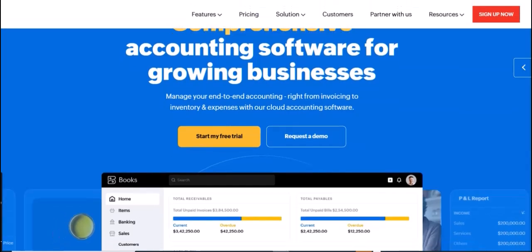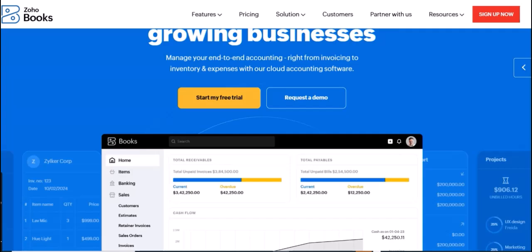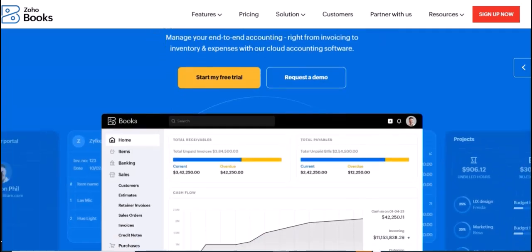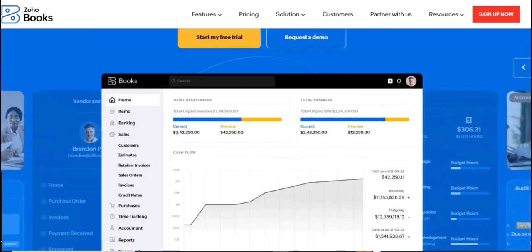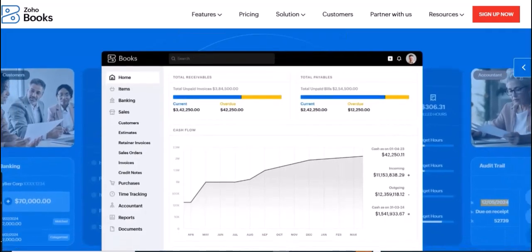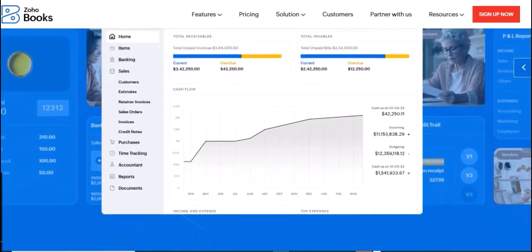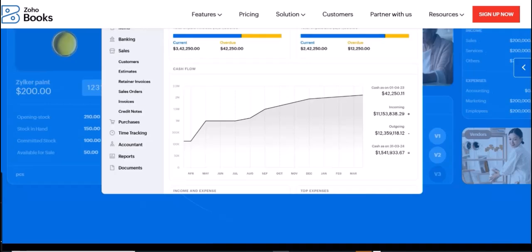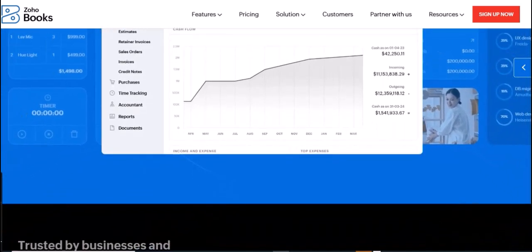How it works in Zoho Books. Zoho Books allows you to track the time spent by each team member on specific project tasks. You can set hourly rates for different roles or individuals. When invoicing, Zoho Books automatically calculates the total labor cost based on the tracked hours and the assigned rates. You can also add expenses for materials, travel, or other direct costs incurred during the project.